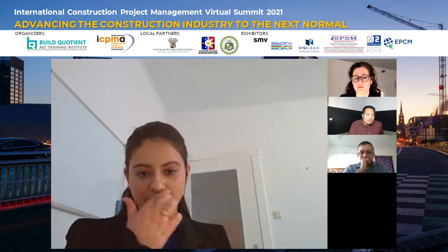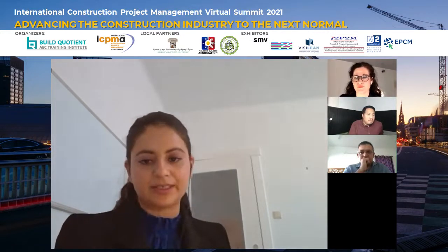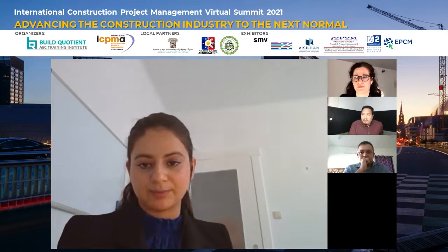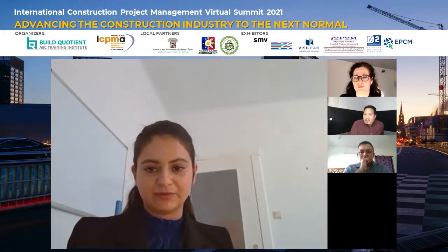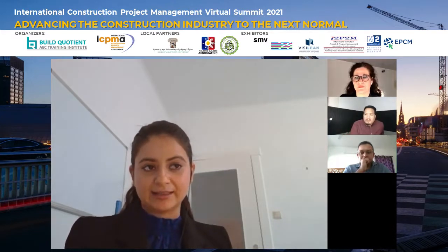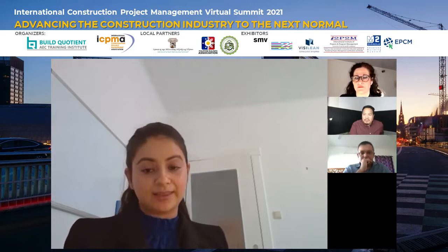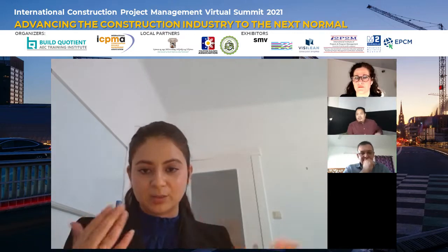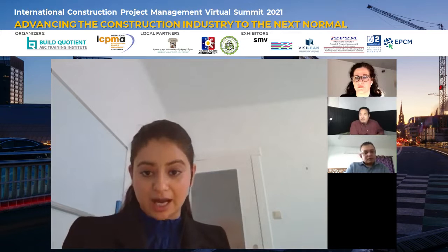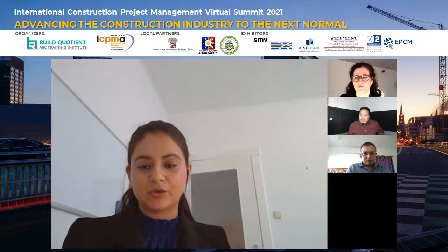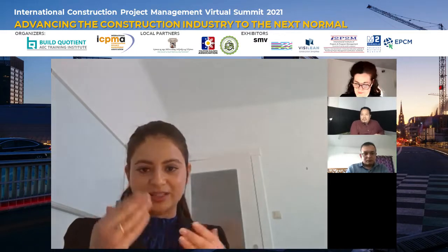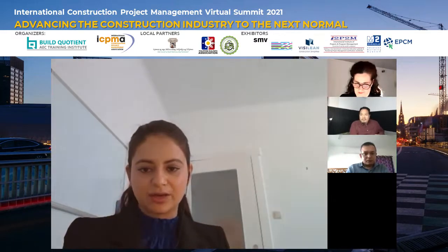I see nowadays that most of the contractors, as Dr. Dave said, are having their in-house BIM departments, and that actually helps them, because one of the functionalities of BIM is 4D scheduling. How absurd it might sound, it's quite helpful. During my research, I used Vico Office for doing the 4D scheduling, and at the end we calculated that the productivity we can achieve with that is quite high compared to simple MS Project. Because in 4D planning, you can see the activities, how they're linked with each other, and you can synchronize the whole process.